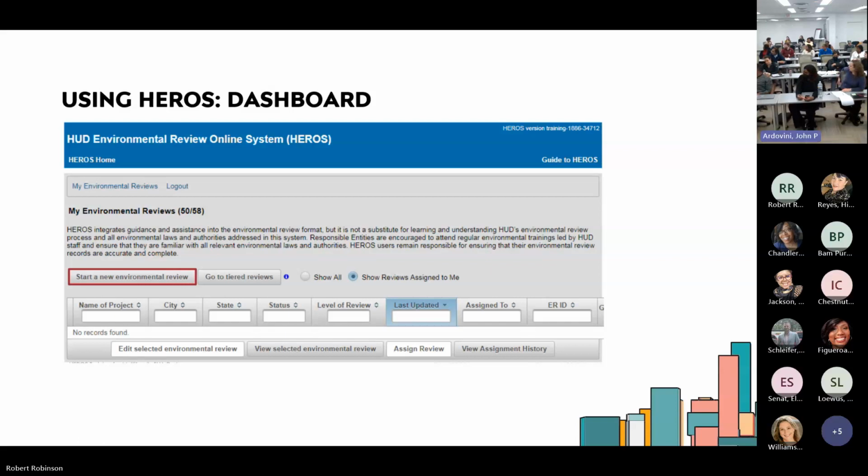Sure. On the 30-day clock, and then they come back and say, well, we need some additional time, for example, on an MOA. No, it's 30 days for the SHPO and THPO to respond. Actually, THPO doesn't have to. I don't think they even have to respond. They get longer, but SHPO, once they respond and you're engaging with them, it ends when they say it ends.